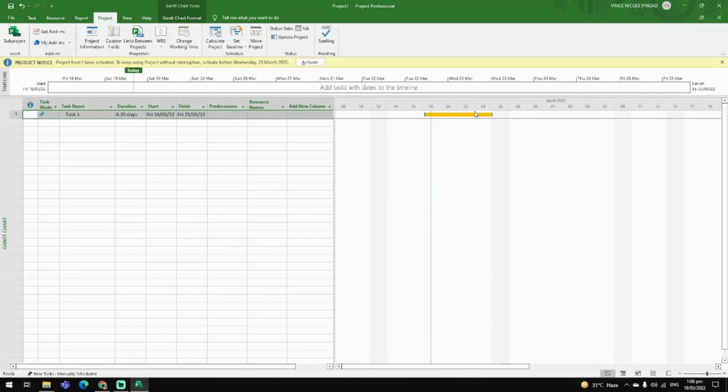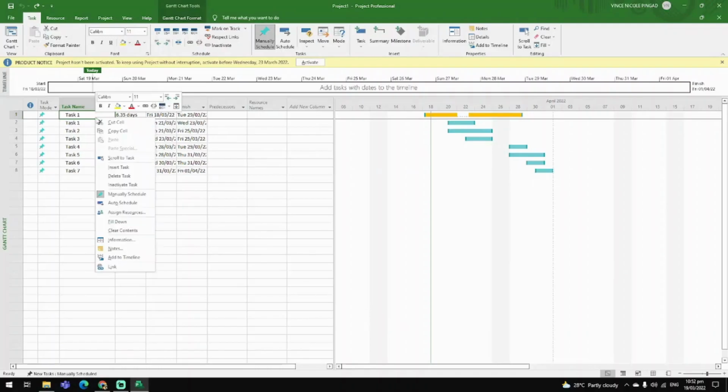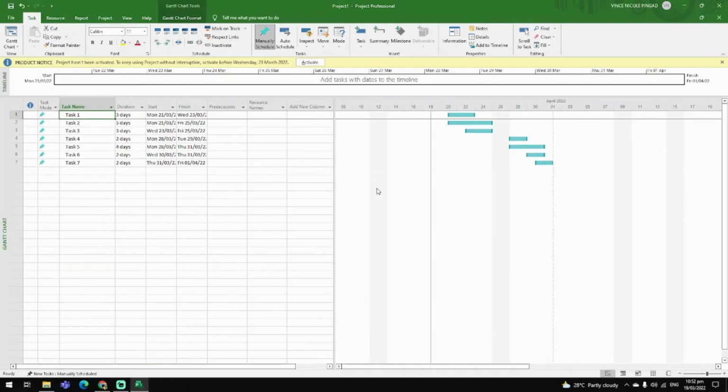You can split a task by right-clicking the bar and going to Split Task. This splits the task into two independent parts separated by a single day and without changing the task duration. This is used to free some working hours to dedicate to a more important task. If you want to delete a task, just right-click and select Delete Task.